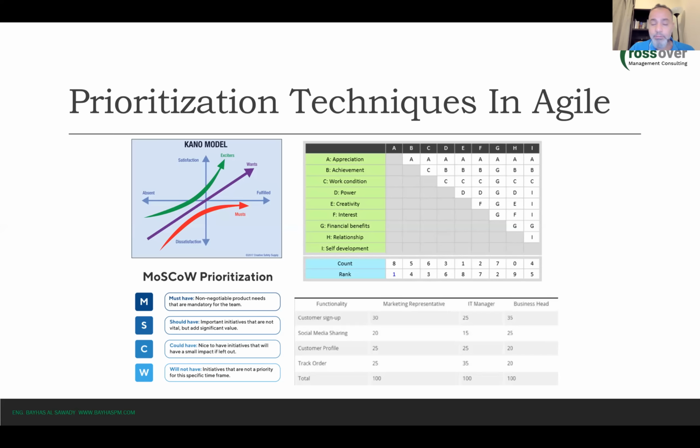We mentioned how user stories are developed and the form that the product owner should use while developing user stories. And we also discussed how estimating is done in agile projects, where estimation reflects the complexity of the user story, and we assign Fibonacci numbers to indicate the complexity.